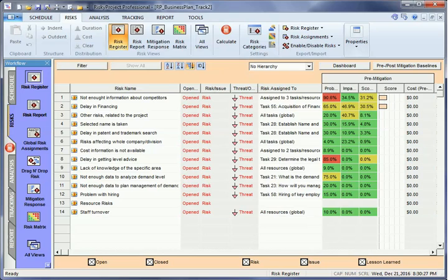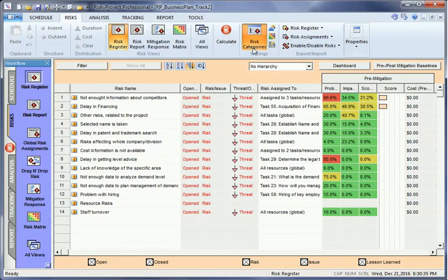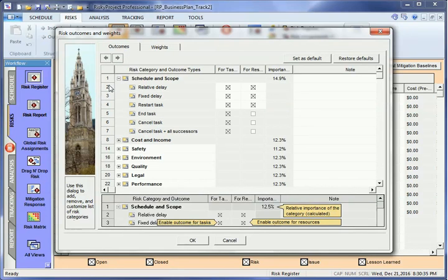You can view and customize these categories using the risk categories dialog. For each risk category, there is an outcome type, which defines what can actually happen if the risk occurs.